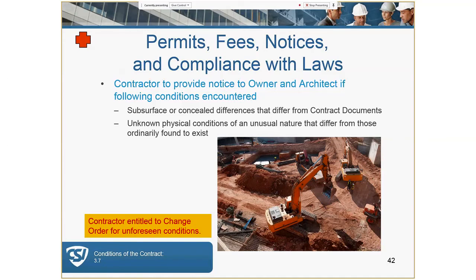The contractor needs to provide prompt notice to the owner and architect if hidden conditions are encountered — bad soils, hidden conditions, foundations of old or adjacent buildings that might be uncovered. Prompt notice is required.